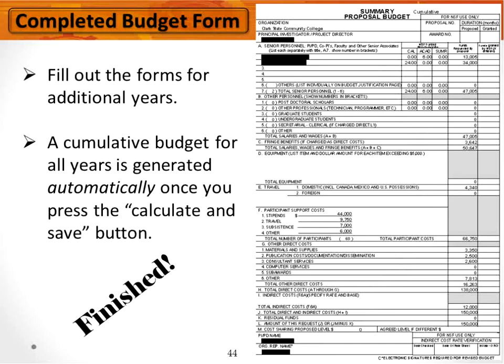The reason you are requesting funds for various purposes should be logical. You should never ask for money in the budget that does not tie directly to an activity or something or someone that you've described in the project description. The budget and budget description should be mutually supportive. You are allowed up to 3 pages for your budget justification. It is uploaded separately within the budget section and is not counted towards any other page limits in preparing the proposal. There is no specific format required for a budget justification, and I will share some commonly used formats for this.